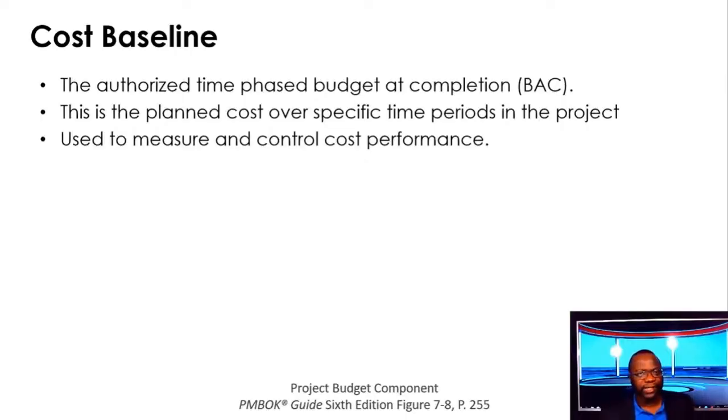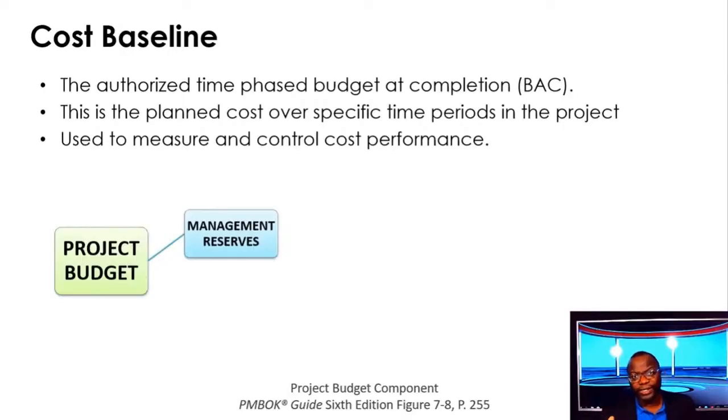So let's talk about the cost baseline. This is a very important part that I want you to know because it is a setup to better get a grasp of earned value in the real world. So your project budget, the word budget is used loosely in earned value, but outside of earned value, it means something totally different. When we talk about the budget, a big part of it could be, depending on the project, management reserves. Management reserves are not part of your cost baseline. This is very important. Your cost baseline is a standalone item and it is used for tracking the earned value performance. Management reserves is not part of your cost baseline. So keep that in mind.